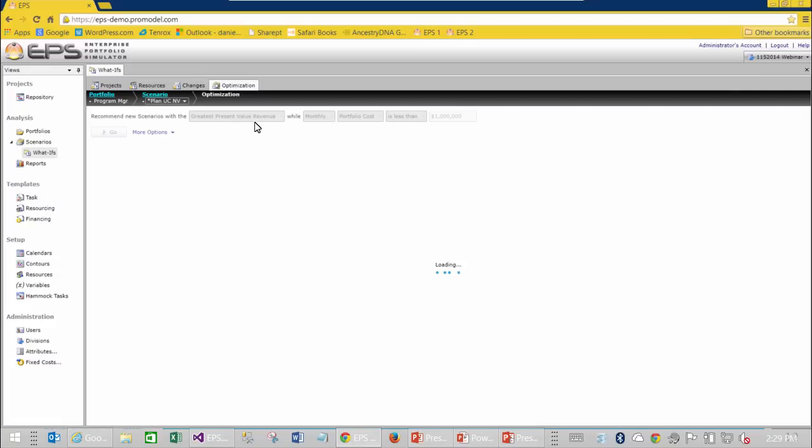But basically what we're going to do is we're going to tell the computer, hey, this is what I want you to maximize, but while doing X. So usually it's, you know, maximize my net present value, but I only want to spend $1 million a month. I want to maintain my cost at $1 million a month. So here's our list of all the things that we can do. I'm going to select greatest net present value, but you can see like earliest prioritized finish, earliest total finish, highest project throughput. So I'll do the NPV, and I'll just keep it at that.